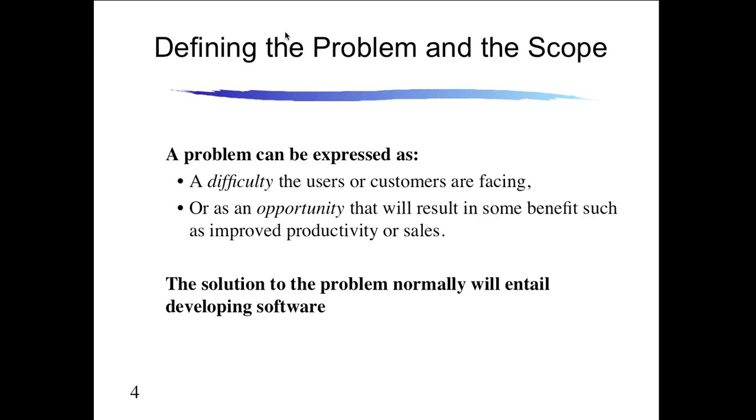One of the most popular you probably have heard of is called scope creep, where the project never actually finishes because nobody ever reads the scope or follows the scope. And the interesting thing about the requirements document is this is your contract. If it's not in the requirements, you're not building it. If you said the scope was version 1 to include features X, Y, and Z, features A, B, and C are not in there. So somebody in the management team or the project development team should put their foot down and say, hey, wait a minute, this is X, Y, Z, this is what the requirements doc is for, and that prevents scope creep, which is a common problem. Or you go back and you change the requirements doc to include extra stuff.